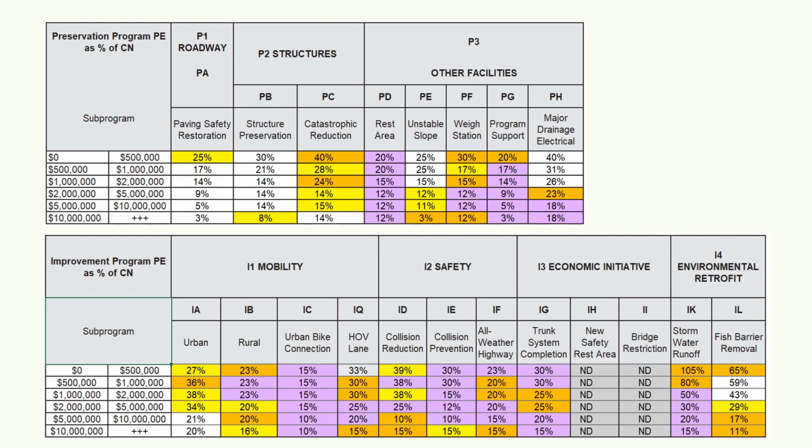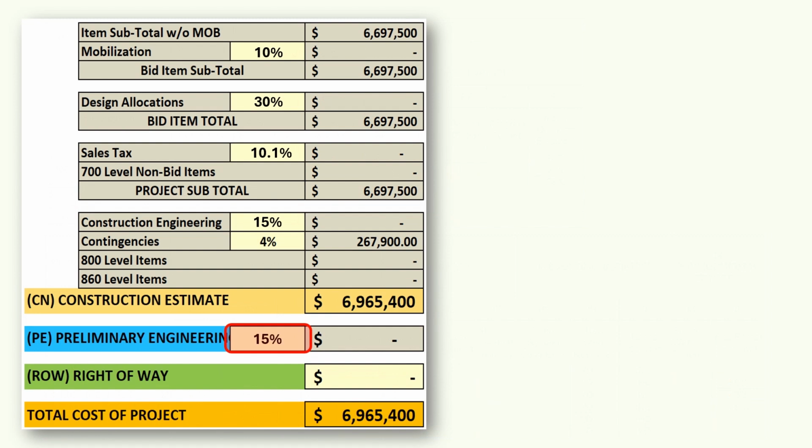This establishes your budget for the entire design phase, including environmental, permitting, consultants if any, communications, open houses, survey, right-of-way plan preparation, and all specialty services and subject matter experts that will be charging their time to your design. Enter that percentage here. Finally, ask the real estate services to estimate the right-of-way costs for your project, which includes